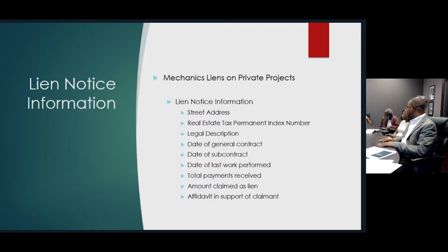And that's basically what they're proposing, and then they are assuming that if they get the work and they sign off on that, that proposal becomes a contract. Yes. Is that indeed a valid contract, or is it just a formal proposal? That is an excellent question. And timing is everything. If you send in a proposal and it is signed off prior to you performing the work, that becomes a contract.